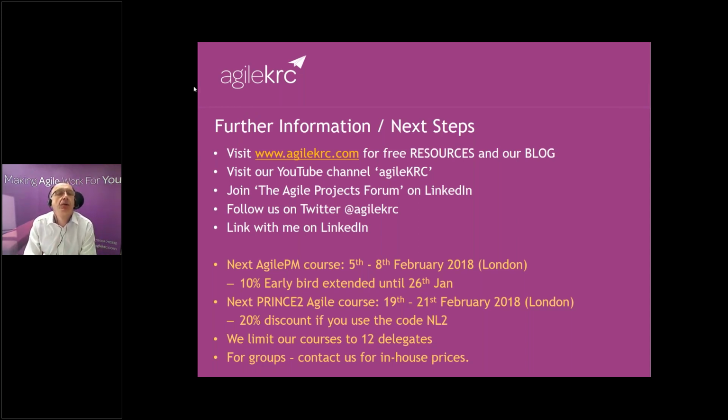John, can we call Agile project management a simultaneous sequence of multiple waterfall methodology? That's a brilliant question. The short answer is actually yes. When we train Agile, we say you still need to do analysis, design, build, whatever. You still need to do the technical work. It's just lots and lots of mini waterfalls, and these waterfalls could be lasting a day or 2 days or 3 days.